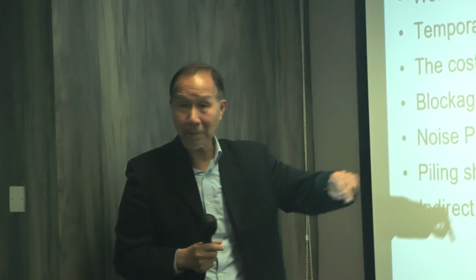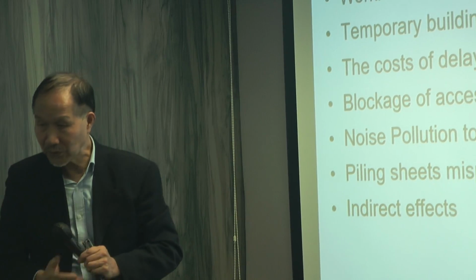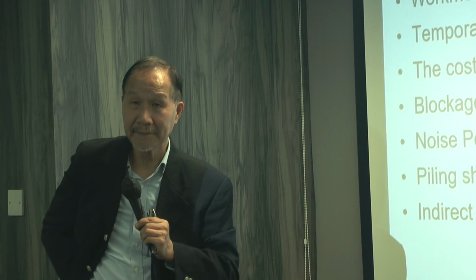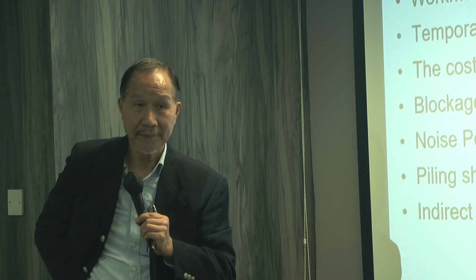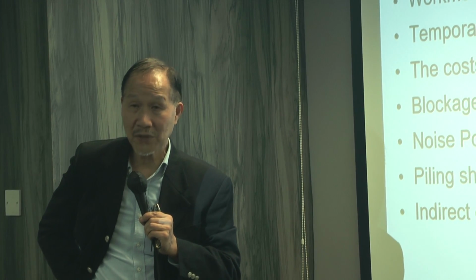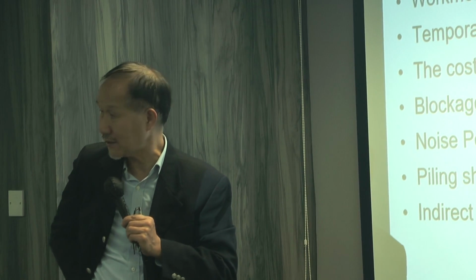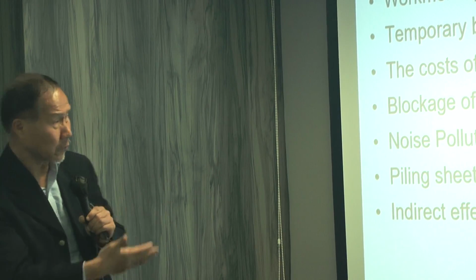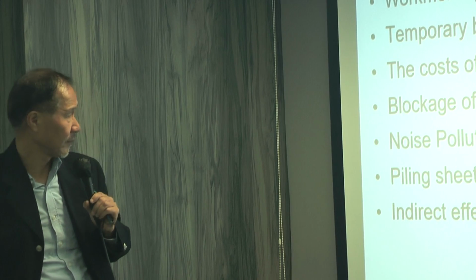Noise pollution to third parties. Why is noise pollution to third parties not an insurance subject? It happens daily. It's not an accident. So if at a construction site you have noise pollution, it's daily. It's not an event. And it's very difficult to prove damage.